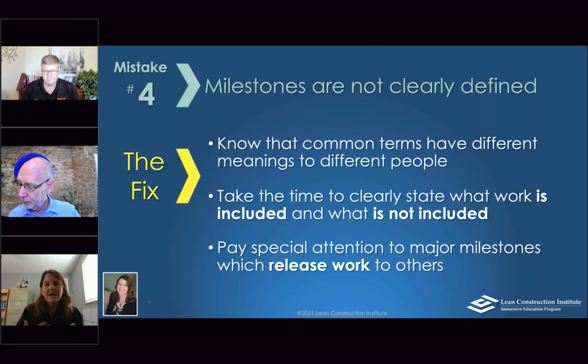If you think about sitting down and doing a milestone for the design of a project, and I might say we're in SDs. Okay, well, that's fine. My electrical engineer may have one idea of what that means, and my mechanical engineer may have a different idea of what that means, which documents and deliverables are a part of it. So we need to define it. We need to make sure that it's clear to the whole team.